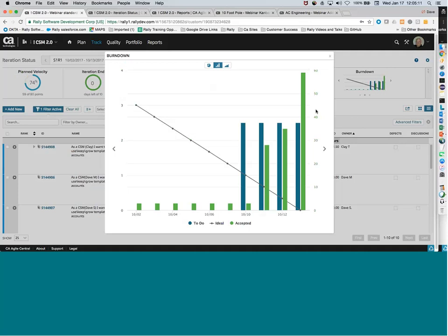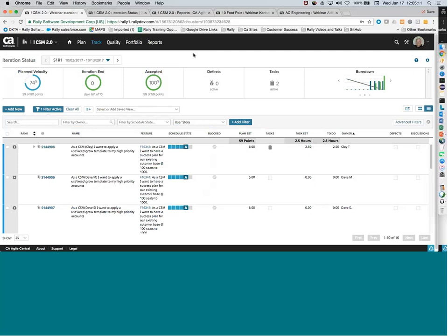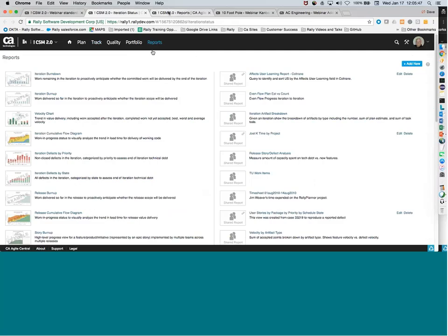On the other side of the coin, you have teams that are consistently not finishing their work. So sprint to sprint, they're not completing the committed work and then having to push that work forward. So again, maybe there's an issue there with not estimating correctly, or needing to work on that, or just maybe a little overzealous and committing to too much work.